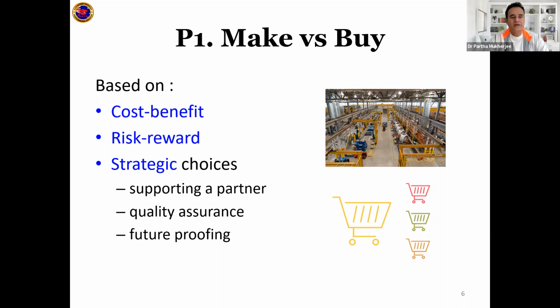In that case, you will decide whether to make or to buy based on the cost that you will incur and the benefit you will get. For example, if you're shipping from Japan, you will not only incur the cost of manufacturing, but also the cost of the transportation, clearance, storage, and there could be damages involved.